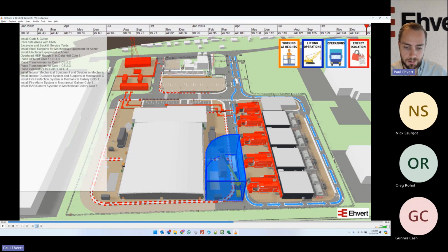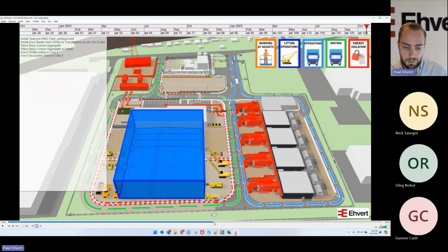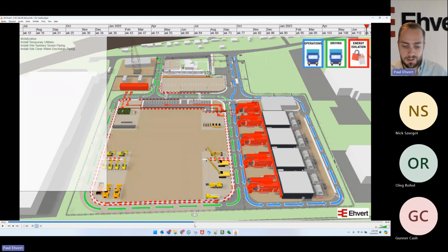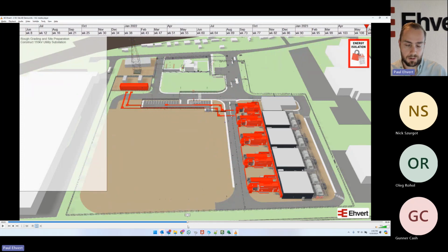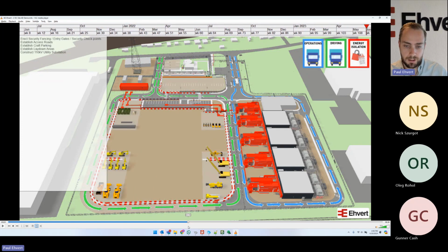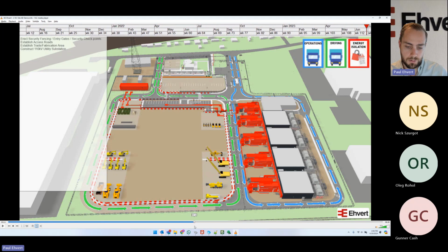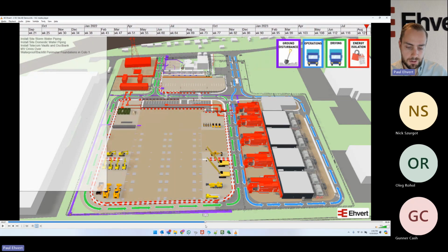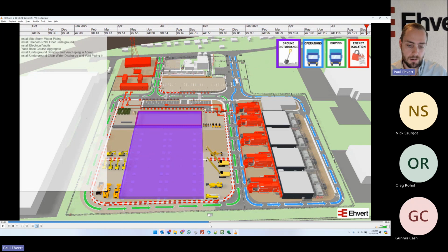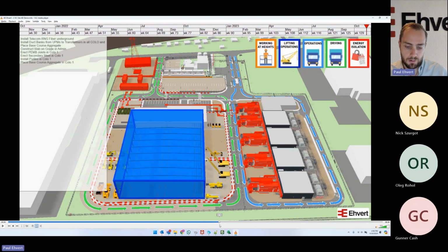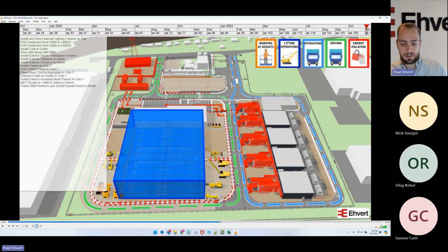We can do a little bit on the inside, but we'll really focus, I'd say 90% of our efforts, on the exterior. So in terms of our sequencing, I know you've already started with the underground utilities. We can tie that in, especially at the end as a presentation tool. It'll be helpful to give you an overall timeline and visual for services going into the site. So we'll do underground services, we'll do the core shell, so foundation, steel, and then the build, and then really focus in on the east equipment yard and the OptiStacks units as they go in.